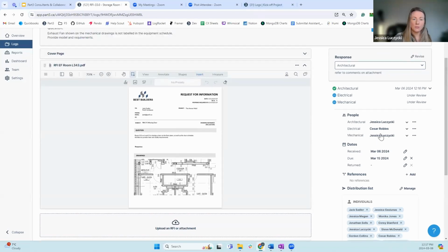You can see the due dates on the side here, and that's important too. If a due date is set, your architect typically sets that up based on the contractual review periods. And they can also set up reminder schedules. I know that reminder schedules can be good and bad, so we don't want to overwhelm you with emails, but your prime consultant has the ability to send you those nudges and reminders because you have so many things that you're juggling on your plate. It's just important to get those email reminders sometimes.